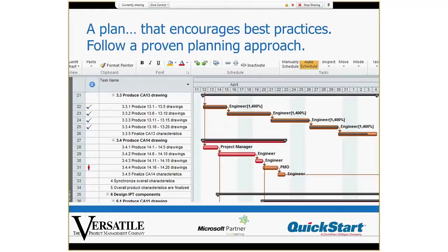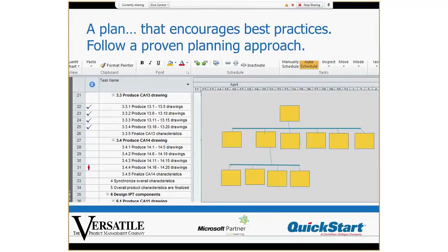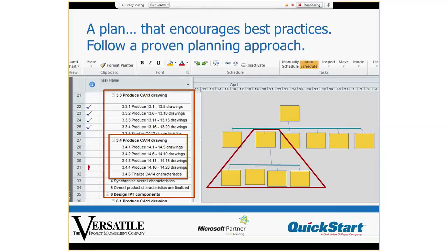This is what people typically see when they look at a good project plan in Microsoft Project. There's a lot going on here, but we can actually take a step-by-step approach to putting all of this together. So remember that work breakdown structure we used, the Post-it notes? This is the list of tasks we talked about before. Okay, we've broken into chunks and smaller chunks, and you can see how that task list shows up here as the basis for the plan. It's a big task that breaks into smaller tasks, right? So it's the exact same thing we discussed before.